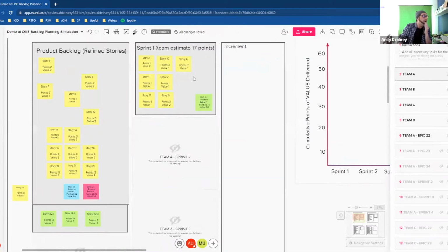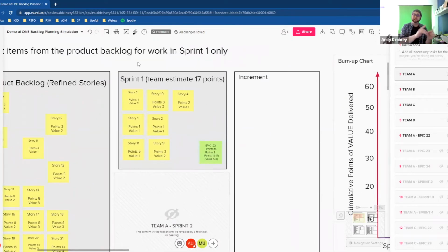So when we go through, I go through each team individually and say, okay, let's have a look at what you did. You committed X amount of points. So for example, this team committed 18 story points of effort, which is one more than the team predicted. Now, when this happens, I reward them and say, well done. You didn't push the team too far. And this 17 is only an estimate. You pushed them one story point and the team really rallied around it because of this epic that they wanted to unlock. So I try and tell a story around that and say, okay, great.